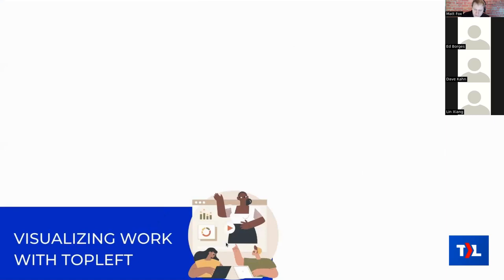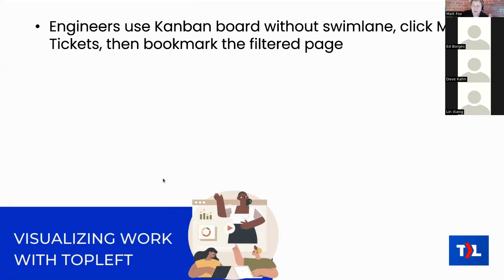Some tools that help engineers visualize their work in top left: engineers should use a Kanban board without a swim lane, filtered to show only their own work. Click 'my tickets' at the top of the board — that filters to just their work. You can then bookmark the resulting URL with the filter applied, or set it as a pinned tab in your browser, so you can get to your personal board in one click.